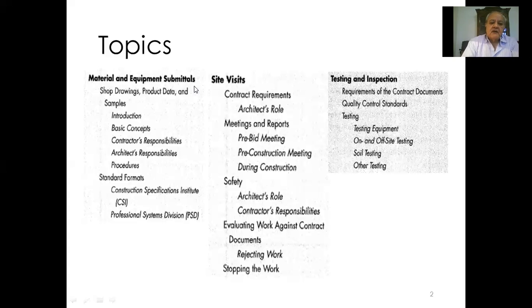So after the building is built, the drawings might be different than the working drawings. So the contractor, if it's part of the contract, they provide you with as-built drawings. Or it can be another job assigned to an architect or a firm.